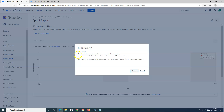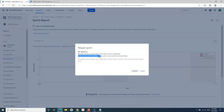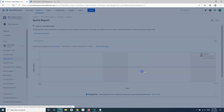A message appears: three issues will be moved back to the sprint you are reopening, and three issues are part of another active sprint and cannot be moved back. This is because whatever issues were completed in RT Sprint 2 will be moved back, but the three issues that were not done in RT Sprint 2 were already moved to RT Sprint 3, so those cannot be moved back when we reopen.